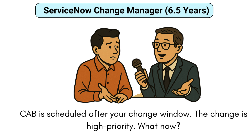So, CAB is scheduled after your change window and the change is high priority — what now? So after going through your question, it means it is truly urgent, like it's fixing a production issue. I would trigger the emergency change in this case, which allows fast approvals from the key stakeholders without waiting for the CAB. If it's not critical, I would postpone the change and notify all stakeholders and update the schedule accordingly and follow the procedure. So I've explained both cases — what I will do in case of urgency and what I will do in case it's not a critical but high priority change.